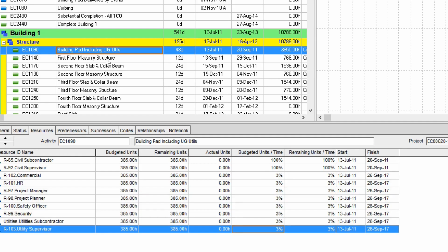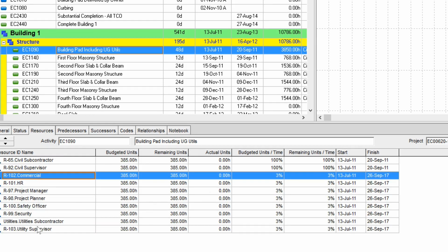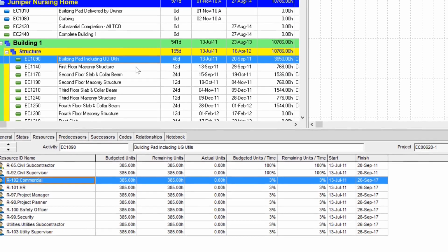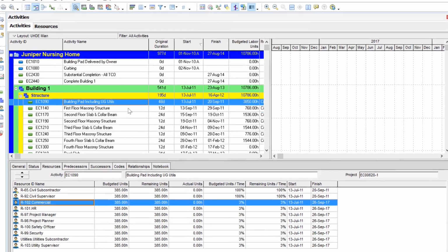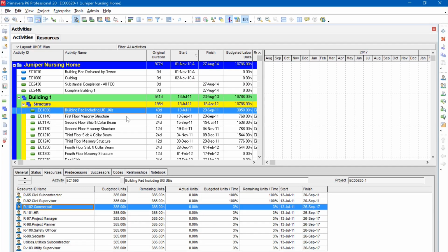And we should know that these activities have to be done by direct resources, and indirect resources are the support and they are not doing any job. Therefore, assigning them to the activities is absolutely wrong. So these are the three popular incorrect resource loading practices. And if you are doing any of these things, most likely your planning system and your reports are wrong.